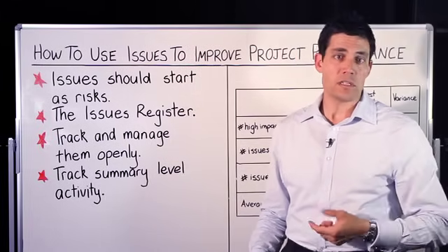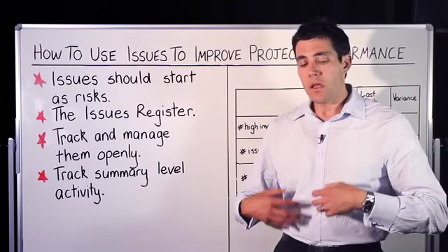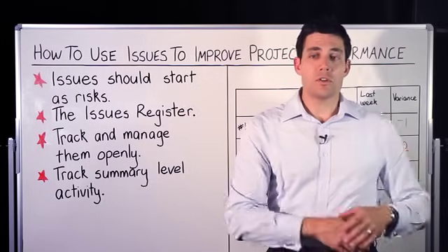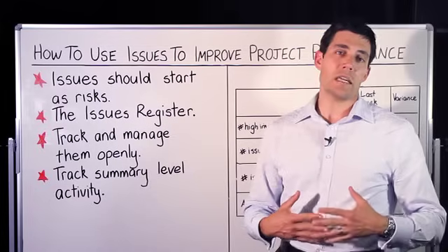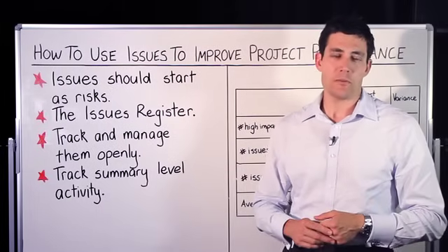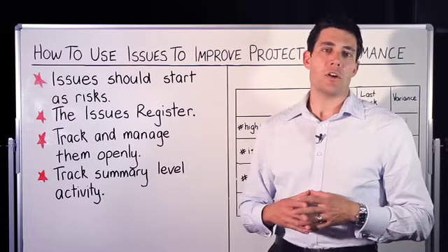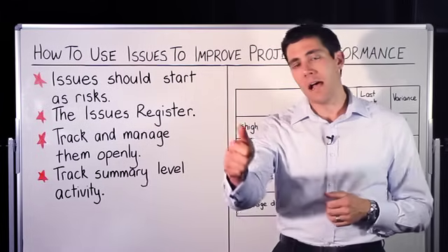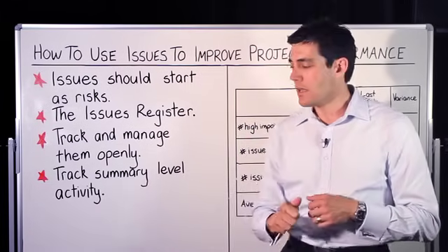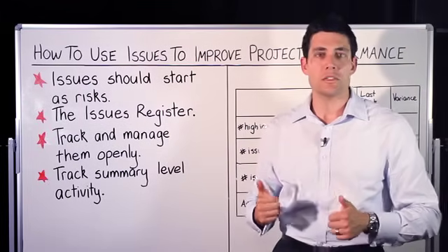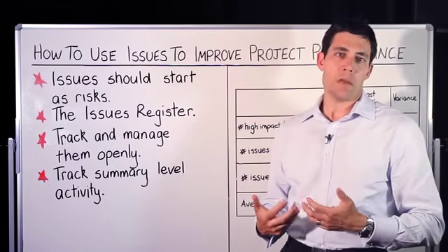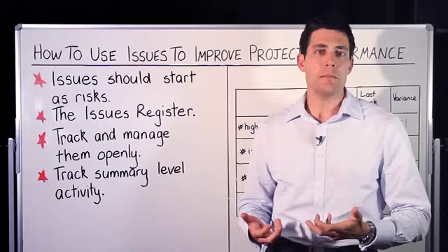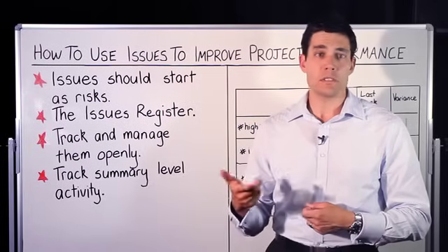you bring those issues out in the open. There's nothing closeted or secret about the issue, and you're getting them to start collaborating and working together as a team to resolve it. Also, the person who's accountable for resolving that issue, if you're discussing these things in an open forum, certainly they want to come to that meeting prepared with the latest update, or in fact telling you that, hey, I've closed that issue, I'm such a great person, and they're getting that pat on the back for closing that issue. If you track it openly with the project team members on a regular basis, you'll find that accountability for resolving those issues becomes inherent with the project team, and those issues will start closing down.